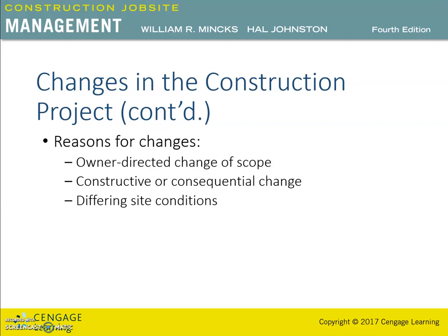So, for instance, many times in renovation projects, the designer does not have all of the previous construction details and plans of the original project that existed prior to the redesign. Unknown or latent conditions can appear after the start of the construction, which can cause a change to the contract.